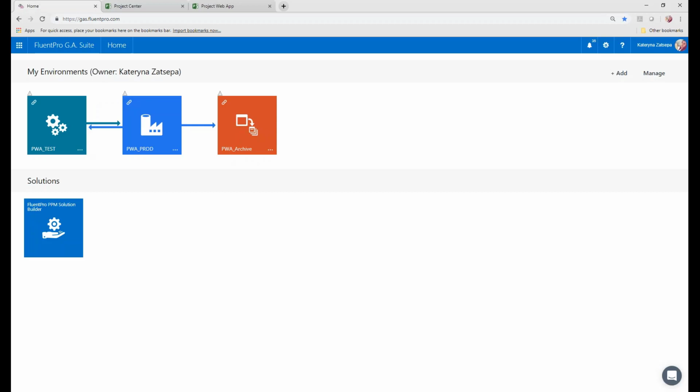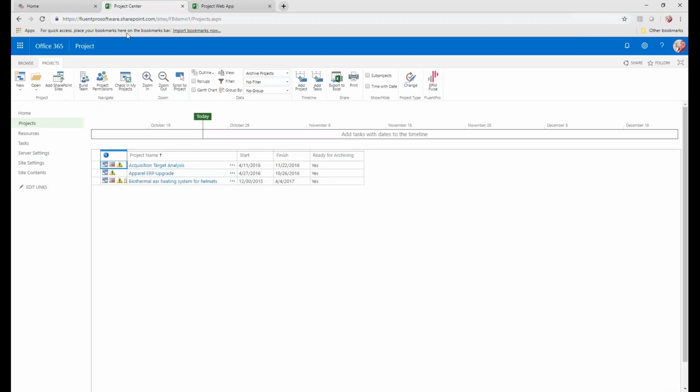So I can hardly imagine the size of effort and time for a manual activity of moving a project site, and using GA Suite, it would be much easier. What I started with was to specify a new site collection where project sites will be created from now on. And the place to specify a new site collection is, of course, an enterprise project type.